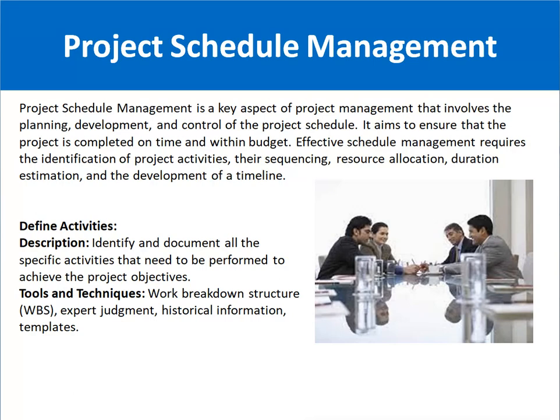Define activities means, friends, that basically we sit with the customer, try to understand his objective, what he actually wants to achieve from the project, and we have to identify and document the specific activities. For example, he wants to build an e-commerce website. What is his target, his objective? For example, he wants to increase his revenue. So what are the activities required to build a website for e-commerce, let's suppose?